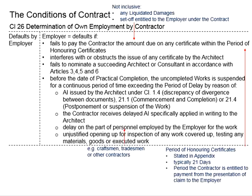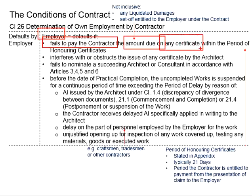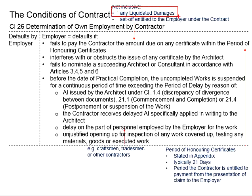We first need to establish the defaults by the employer. An employer is considered in default if one of the following happens. First, if the employer fails to pay the contractor the amount due on any certificate within the period of honouring certificate. This means the employer does not pay the contractor for the work done within a certain stipulated duration. The amount to be paid will be for work done by the contractor, not inclusive of any liquidated damages or set-off entitled by the employer.